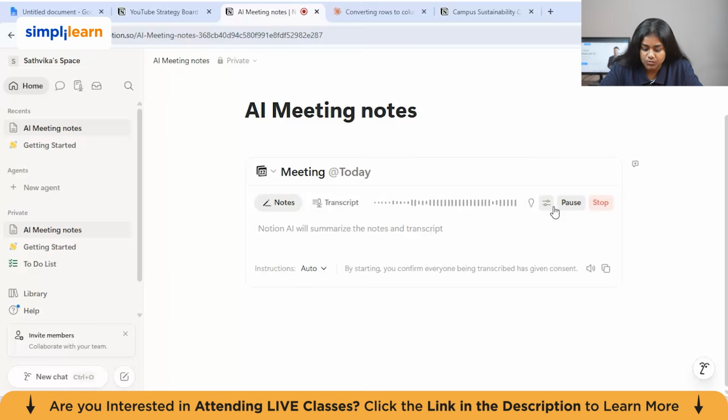The campaign launch event will be held on June 1st at the main auditorium. We're also partnering with the campus cafeteria to eliminate single-use plastic by end of June. So now moving to the action items and owners. Priya will design the campaign poster by May 25th. The social media team will create 10 posts for launch by May 28th. The outreach team will contact all department heads for participation by May 22nd. The tech team will build the campaign tracker in Notion by May 23rd.